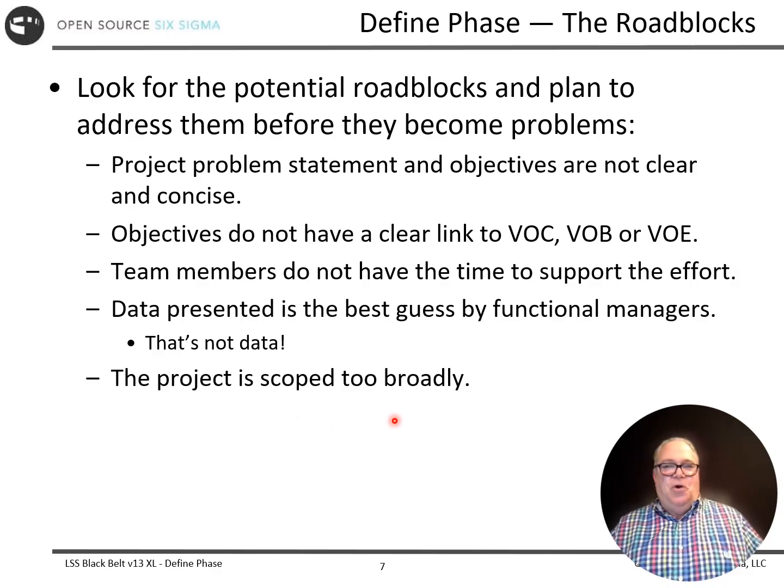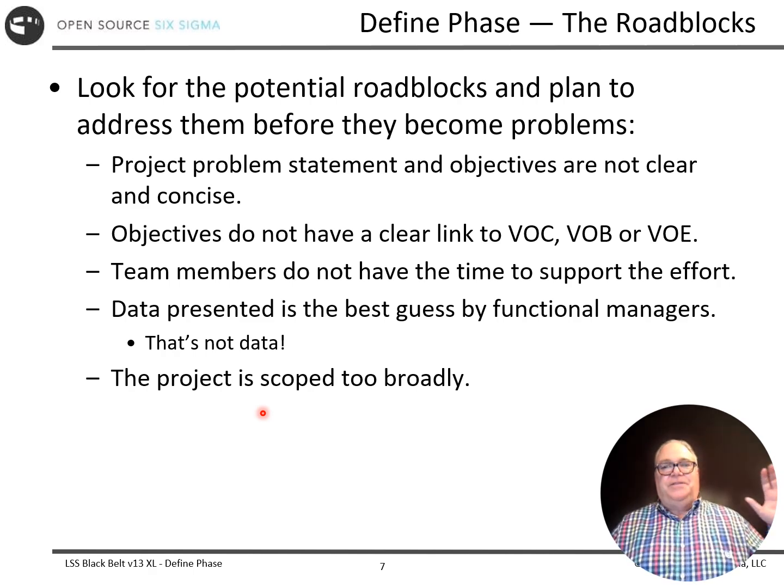And scope, scope, scope. Avoid scope creep at all costs, unless we're willing to take a step back and look at the charter and go, okay, if we're going to rescope it in this fashion, then this is how we have to reshape the activities, and these are the resources we need to do that.